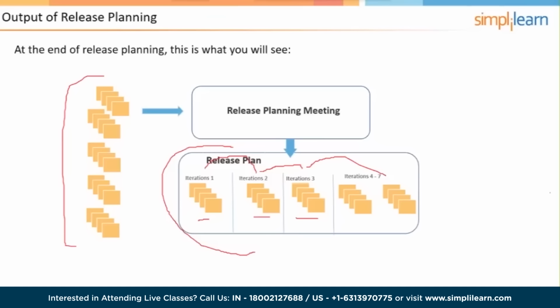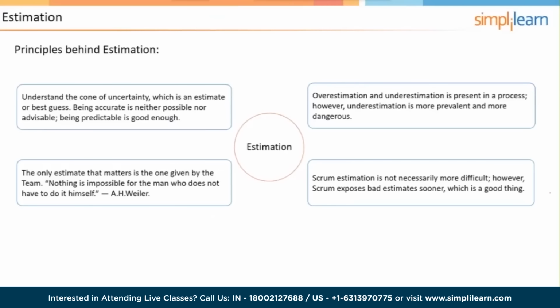It's called rolling wave planning, where we do detailed planning for things in the near term in tandem with high-level planning for things in the future. Did I say that right? And we talked about deciding as late as possible, I believe, meaning that it's better to actually plan the later releases for purposes of making sure we have the most information available. Okay, so estimation.